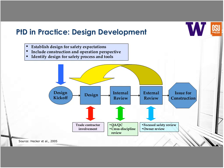After initial design, continued review through cross-discipline reviews, a focused safety review, and owner review follows. Then a redesign incorporates modifications before eventually issuing for construction. That's a process envisioned to assist with incorporating prevention through design. There are many organizations and companies that have done something differently, but this is a fairly standard process. With that, I'd like to hand it back over to Chris, who will talk in detail about the research methods and results.